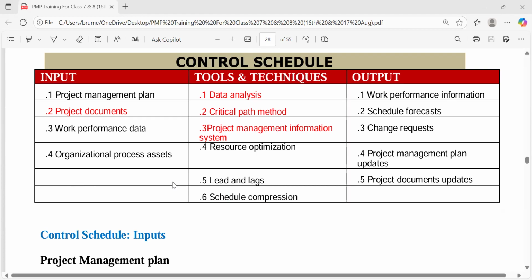You have two activities in two separate communities, and you are bringing in a civil engineer, a tester, an inspector. The supervisor you are bringing in, you schedule on a day when the two projects could be due for inspection. So you just bring him into town and use him to inspect two projects. That is optimization. So this is the new term that just got in here.